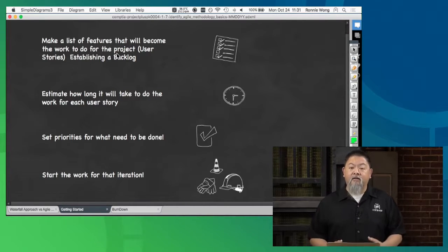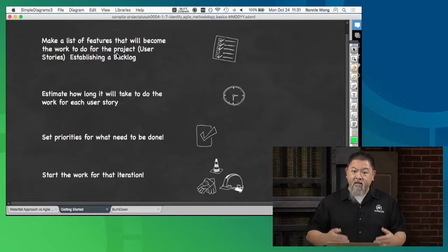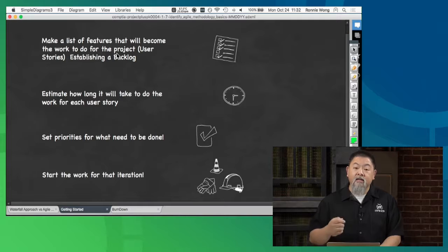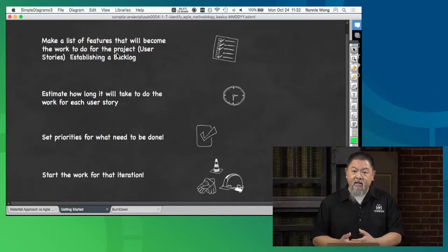But this backlog is also considered a prioritized list as well, okay? And then the work that we tend to do inside each of the sprints is that once we've accomplished one of those items in this backlog, if there's more that needs to be done, or if we've finished with the entire program, what we now need to do is pull more from what they call that backlog.